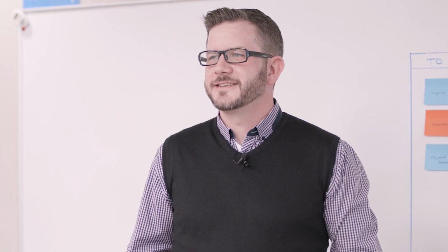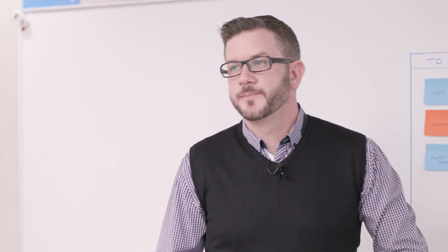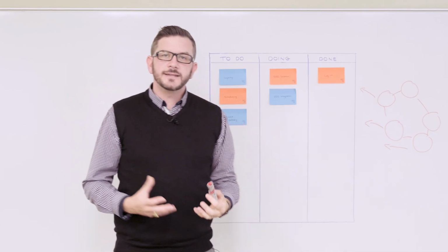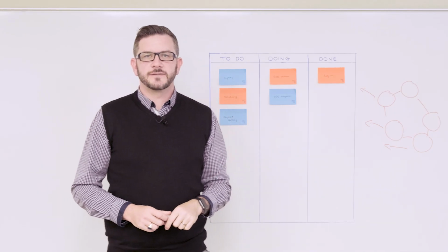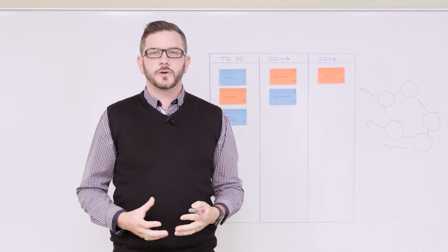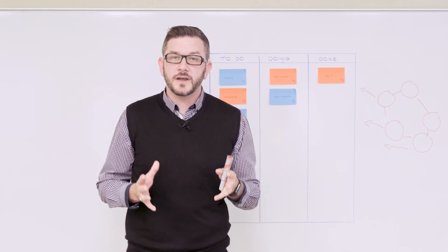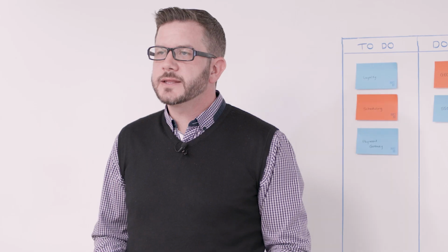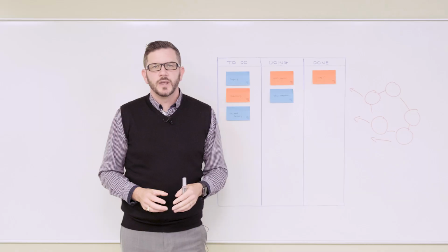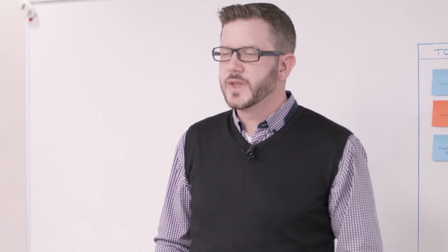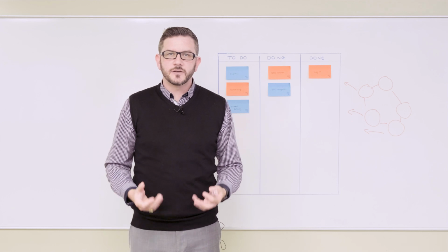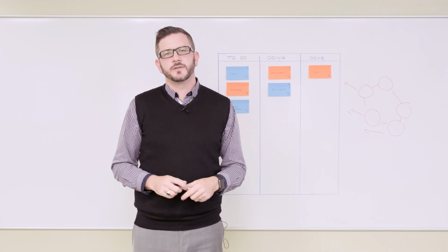The next tip is your team owns the stand-up. They own getting work to done, and ideally they will also own the process of getting rid of blockers after a stand-up. You want to keep your stand-ups short, so park any longer conversations and pick them up after the stand-up as well. And it's called stand-up for a reason. You want to be present, you want to be engaged, it gets your blood flowing and keeps the meeting short.